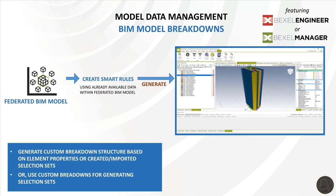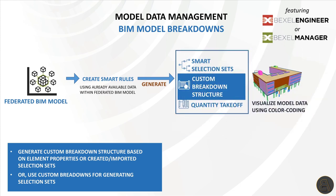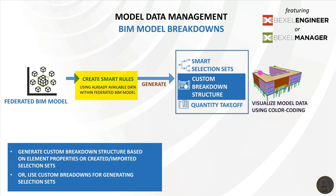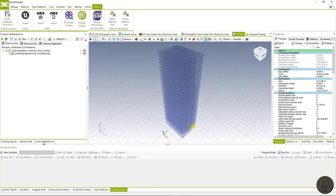Now I will show you how to generate a custom breakdown structure based on element properties. It is important to mention that you can also use selection sets for custom breakdown creation and be even more flexible while creating desired visual and data model analytics. Here the usage of templates is less important since it's a very simple workflow for creating various custom breakdowns. After creating a federated BIM model, you can use existing properties as rules for generating breakdown structure and instantly get results. Also, it is possible to use the creation wizard to automatically create selection sets from custom breakdowns. At the end, visualize breakdowns by using color-coding options.